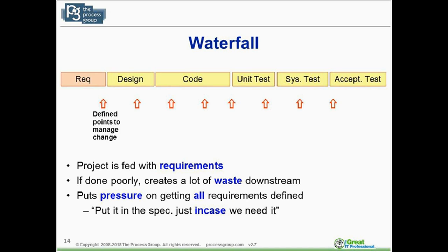a tremendous amount of time has been wasted. But I have a lot of clients that actually do Waterfall, but they're also very good at doing requirements. They're also very good at doing prototyping and feedback loops, which they add to Waterfall. They add risk management to Waterfall, which eliminates or reduces the risk of having bad requirements. So there are things you can easily add to Waterfall to make it a lot more robust and less risky.